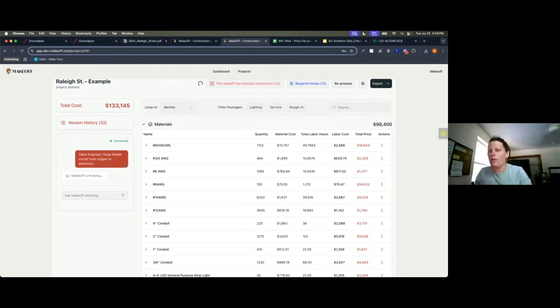Well, what if I ran parallel 250s and just added more parallel runs? With 500s, it was one less run, but it was something like $700 a foot.